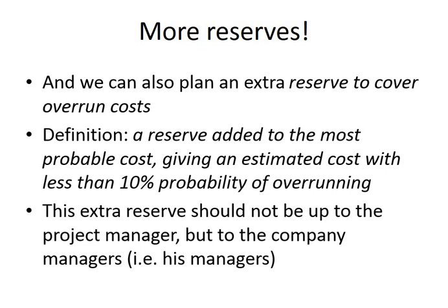It should not be at the disposal of the project manager, but at the disposal of the investor, of the total organization, because this isn't used quite often, but the organization should have some extra possibilities to deal with costs.